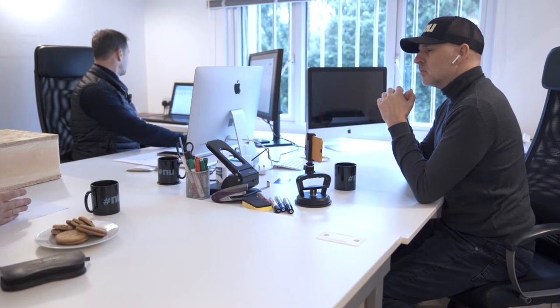The architect said, Andy, I don't like that one beam in there, we've got a down stand, can we put two? So two beams are going in there, so you've got no down stand. We go to and fro on the concept just to get the aesthetics right. Once we've got the concept, we've got a price because we know what we're building. Then we do an approval drawing, which goes to the architect who checks it dimensionally. Once the dimensions are right, we go into detailed fabrication drawings, then procurement and making it. At the same time, our drawings are fed into the architectural drawings, who submit those for building control.